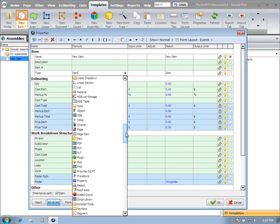But the primary types that the end user is going to be concerned with are going to be the type of material, labor, equipment, subcontract, and other. Those are the five cost groups that are typically used. And those are the five cost groups that the reports that are within PlanSwift are running on.